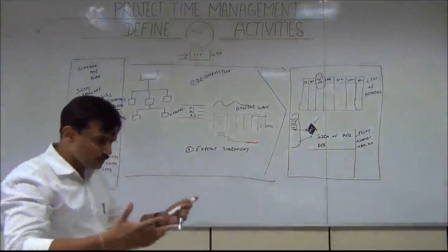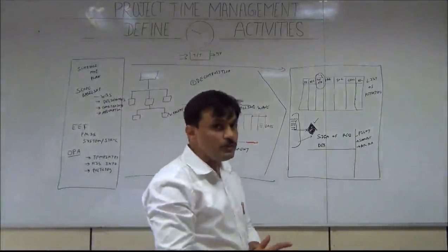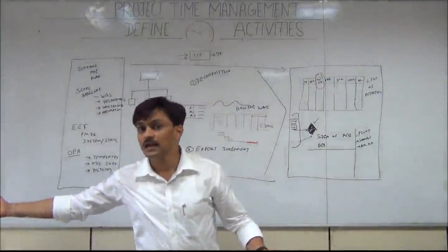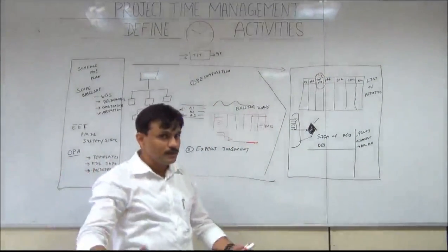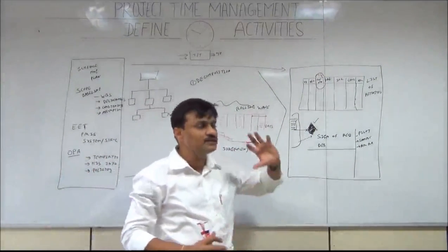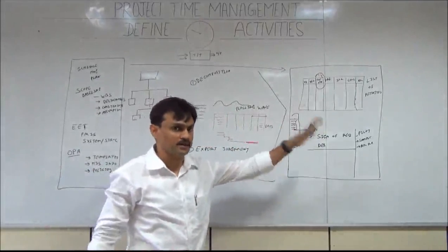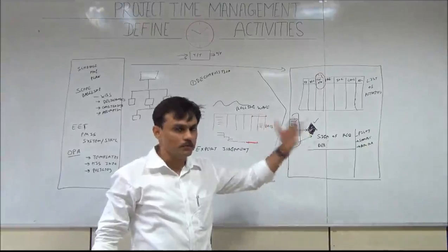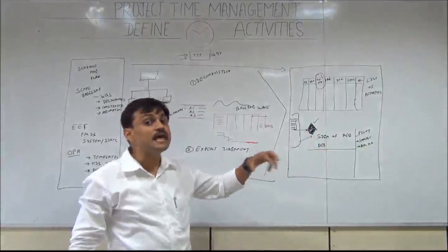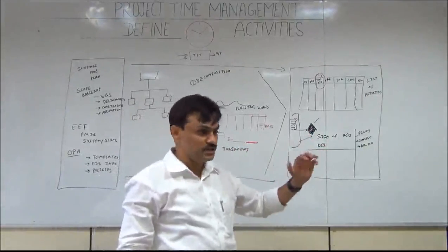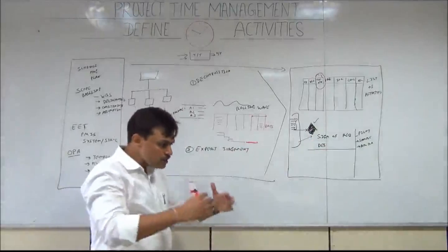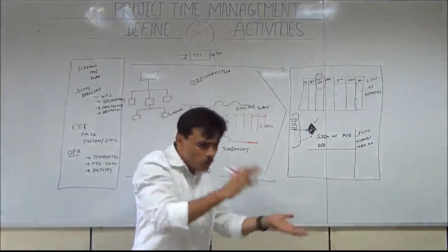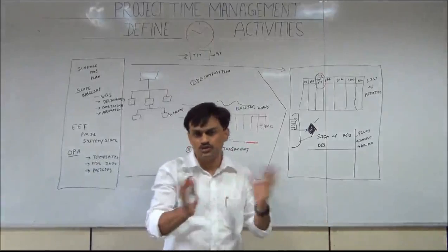It just says, for example, if you are developing a software, we may not plan the deployment while we are doing a requirement analysis. When we are doing a requirement analysis, we may just identify that there will be a deployment activity which will run for 2 months or 1 month. But we not necessarily be elaborating that deployment activity at this particular moment, because we do a progressive elaboration, we do a rolling wave planning, and rolling wave planning and progressive elaboration are used synonymously.